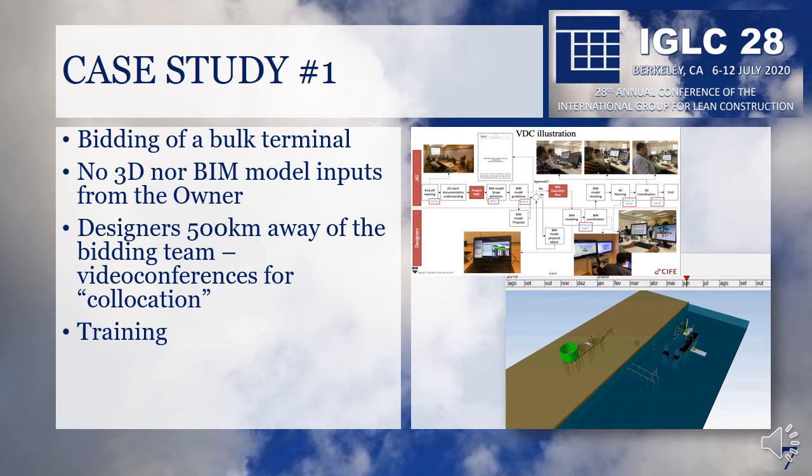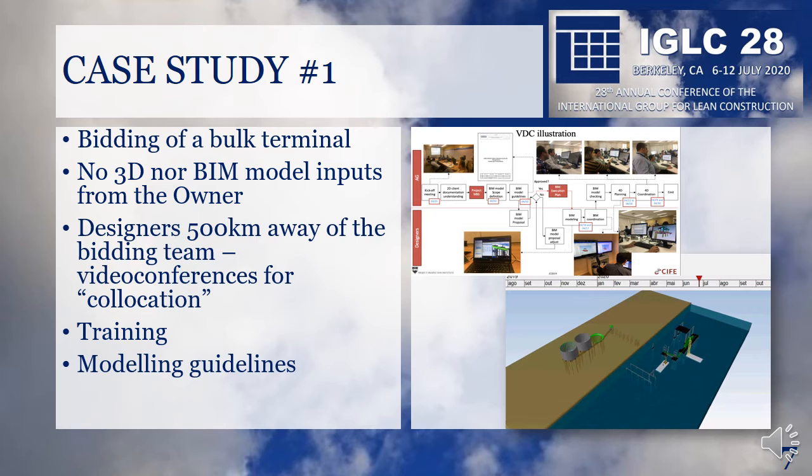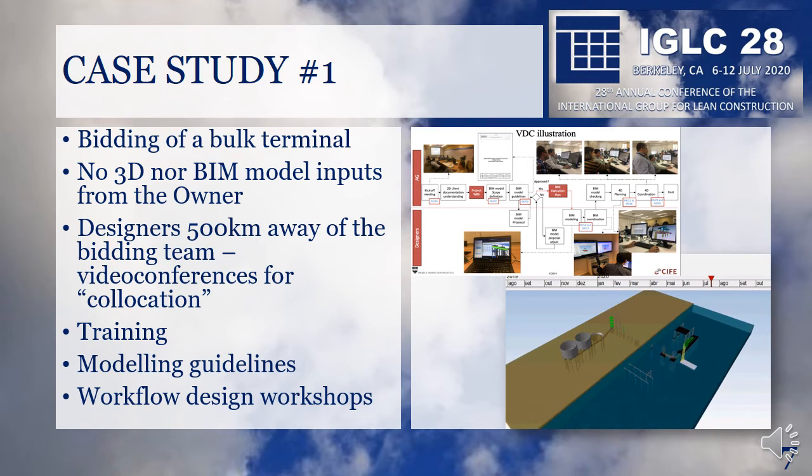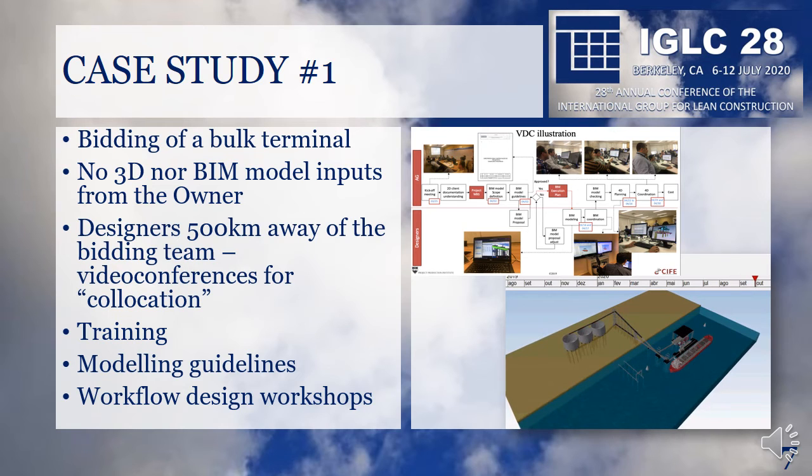After training the stakeholders and establishing the first version of the project's modeling guidelines, a series of workshops was done to conceive a detailed workflow with the tasks that should be accomplished in order to achieve and control the VDC objectives, as shown in the figure. Below, you can see the simulation of one of the planning scenarios.